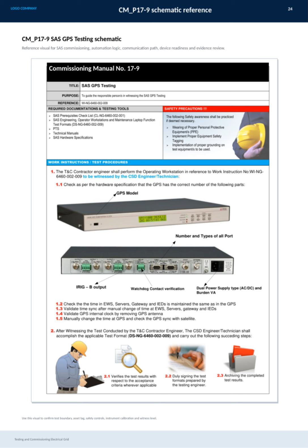Make sure to use it to confirm important aspects like test boundaries, asset tags, safety controls, instrument calibration, and the required witness level. This ensures a thorough and compliant commissioning process according to Commissioning Manual number 17-9.